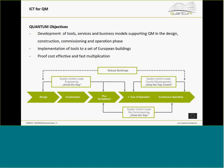These three essential processes address gaps or situations where gaps might occur between design intent and actual operation. The first is to avoid a gap — we want to reach what we have actually intended. Then for existing or new buildings that don't meet the criteria, we try to close the gap, which is a recommissioning approach. And during operation we want to keep that gap closed.